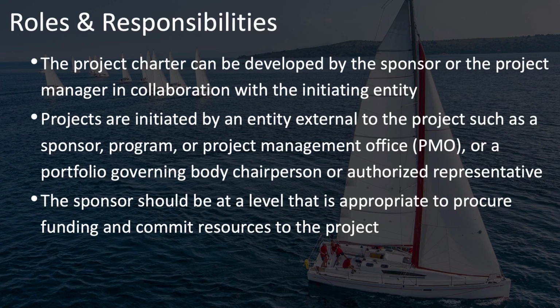On the other hand, you need to maintain a careful balance. If you go too high up the organization, the sponsor may become unavailable and unable to participate in the decisions necessary to manage the project. I'm sure you can think of some examples of projects that you've been managing in which the sponsor has not been available to you as you would have wished, or, on the other end, where the sponsor has been available but not had the authority necessary to get the resources you need.